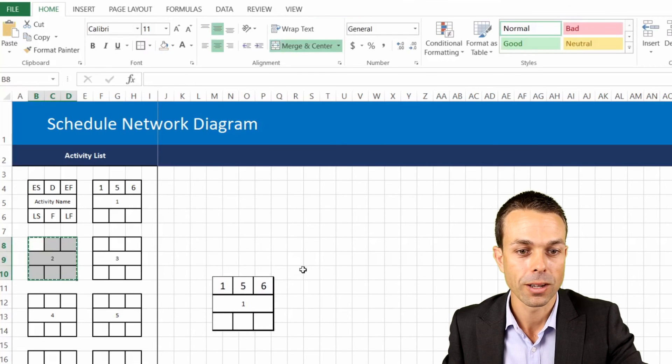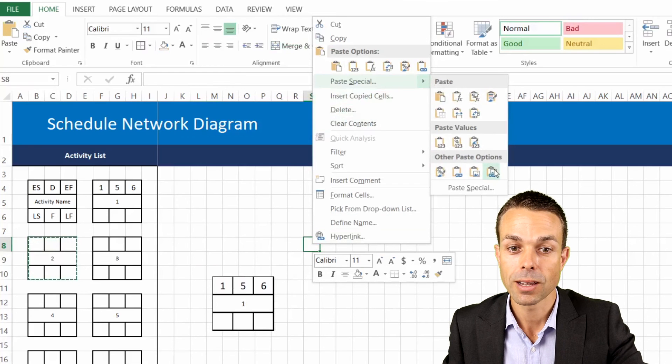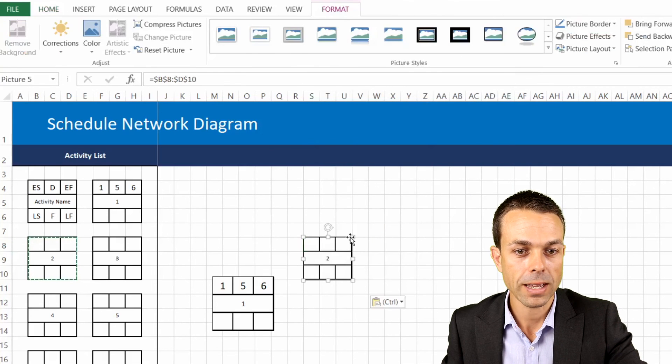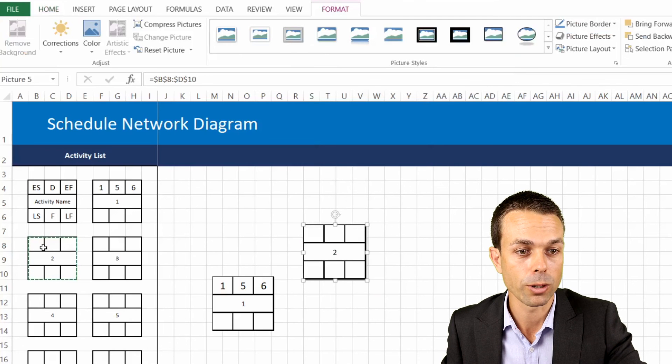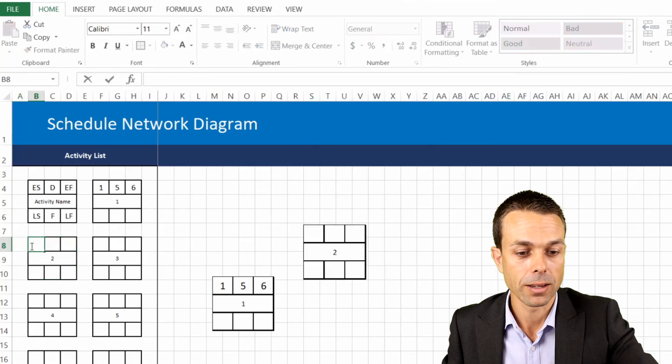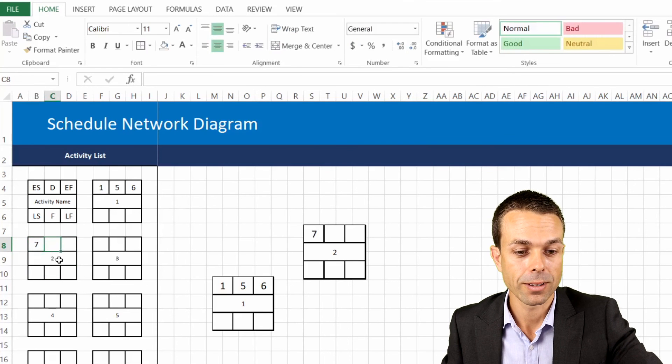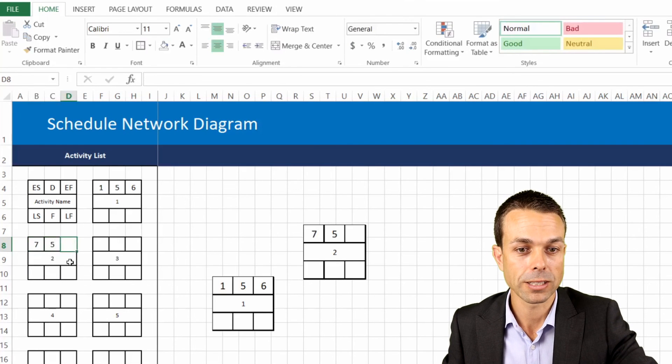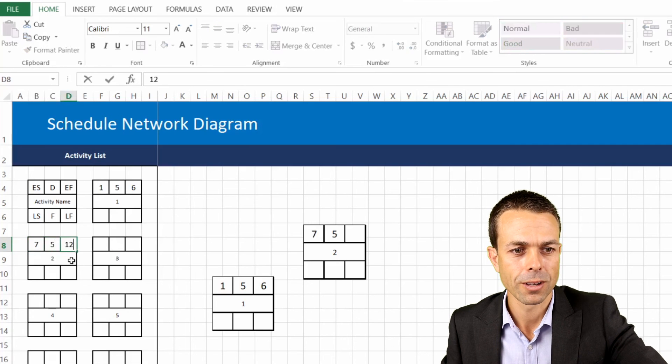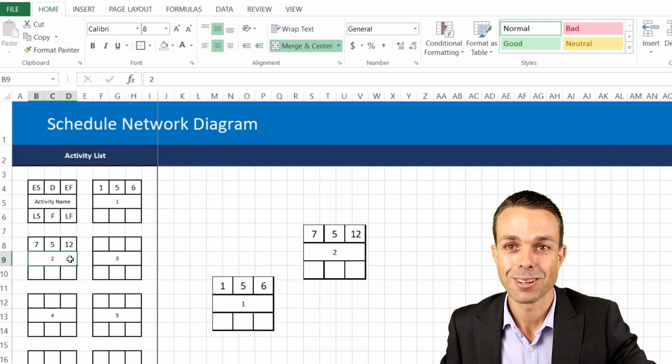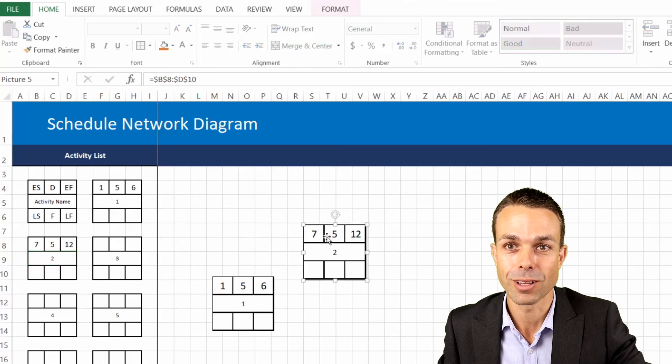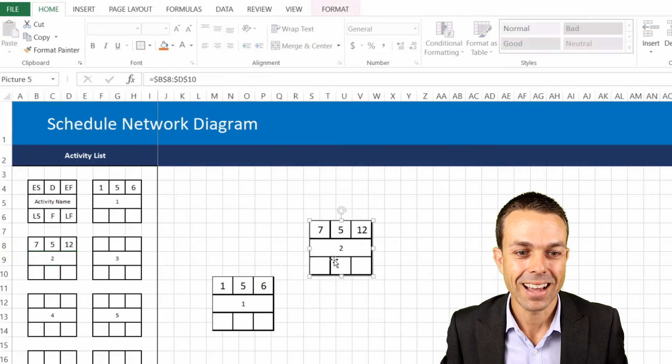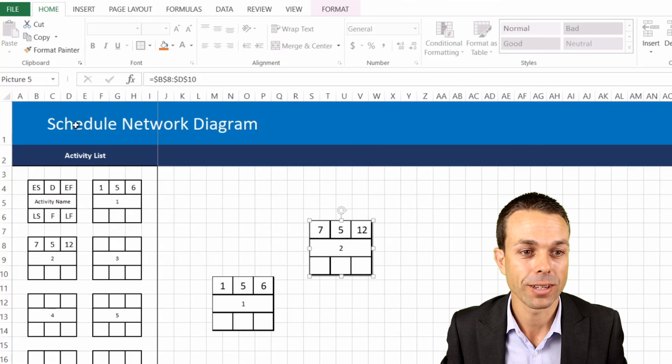So let's say we've got number two, paste special, linked picture, and we can make that bigger or smaller depending on whatever we want. And maybe number two we start on day seven, we've got five days duration and that means we're finishing, if my math is correct, on day 12. As you can see now we're starting to fill out our schedule network diagram.